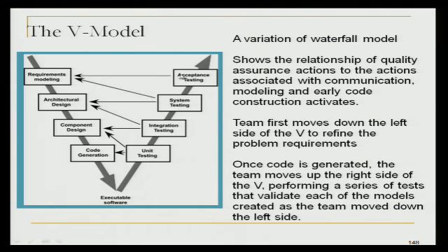And I'm going to validate that every requirement that I ask for will work in my environment with real data, real people, real customers. And if that passes, and you can help me, we'll agree on that system test before we do it. And if all that passes, then I'll sign off on the system or pay you that last check or whatever. So there's a type mapping of responsibility when you get into this kind of a V model.